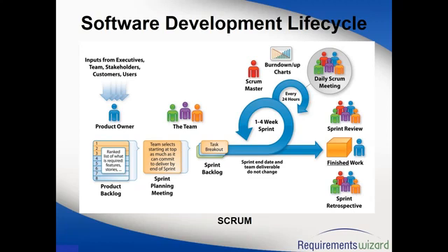And that exact feedback, you are getting it in real time, and that is so valuable because your customer or product owner is seeing the system, and they're telling you, okay, this is good, this is not good, please fix this and make the changes. So you're getting the feedback immediately at the end of the second week. If the same thing was being done using waterfall, you would have got the feedback maybe in the 8th or 9th month. Once everything is designed, developed, and tested, that's when you will give it to the customer to test it. And it may be too late for you to make those changes because everything is completed.